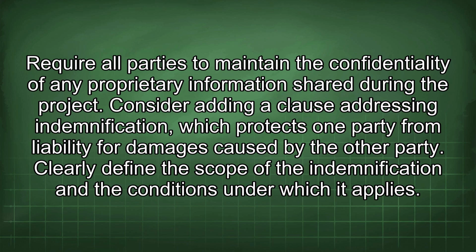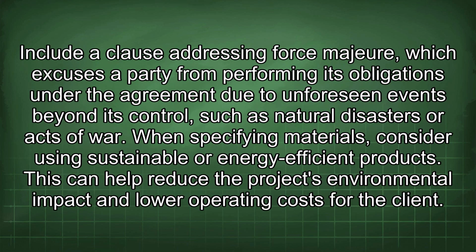Consider adding a clause addressing indemnification, which protects one party from liability for damages caused by the other party. Clearly define the scope of the indemnification and the conditions under which it applies. Include a clause addressing force majeure, which excuses a party from performing its obligations under the agreement due to unforeseen events beyond its control, such as natural disasters or acts of war.